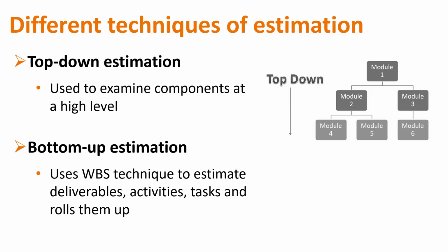So then they go in and look at their stories, and they have their priorities 1 through whatever, because it's prioritized in relative order, which is awesome. Then I look at the top 2 or 3, make sure I'm considering dependencies, and I say, okay, I need to do a sprint in 2 weeks. Well, then stories 1 through 6 are 1 week and almost 2 weeks, not quite. Okay, can 6 be done without 7? Yes, awesome. Then we're going to go to 6. You're still bottom-upping it, because you're still taking the estimates of those individual stories and adding them up to what the total next deliverable will be.